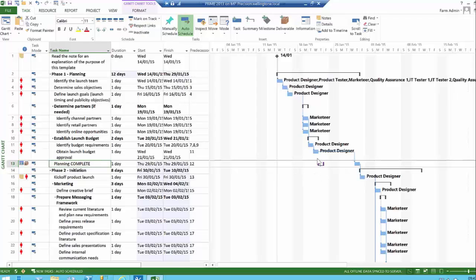You can see over here on the Gantt chart that the deliverable is still on the old date. So I'm going to select the task and go up on the task ribbon to the deliverables, and I'm going to sync the deliverable. What that does then, I hope you saw that on the Gantt chart, it actually moved the little icon of the deliverable and put it onto the schedule.